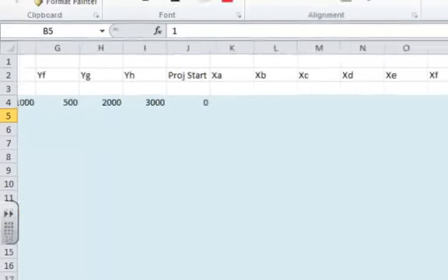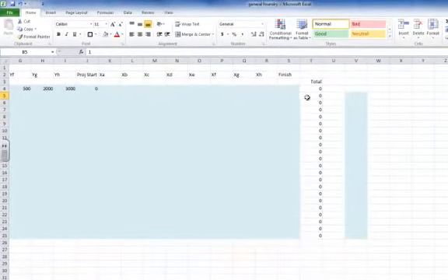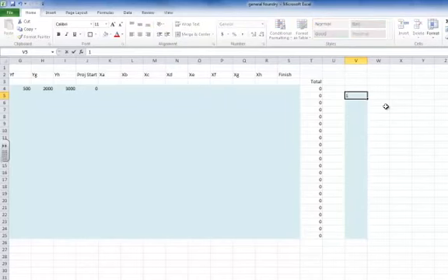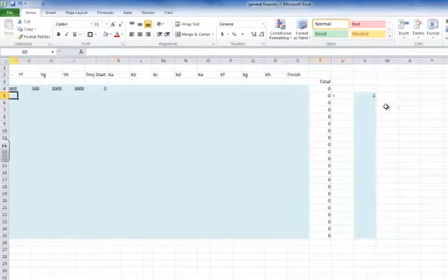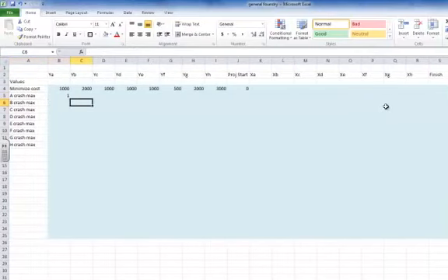And then over here on the right, I know that task A can be crashed a maximum of 1 week, so I have to put in a less than here. Task A has to be crashed less than or equal to 1 week. So now I'm going to continue down and associate each crash max with the variable.